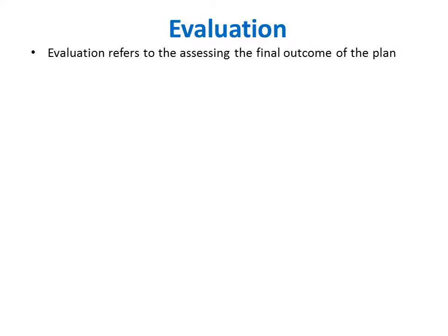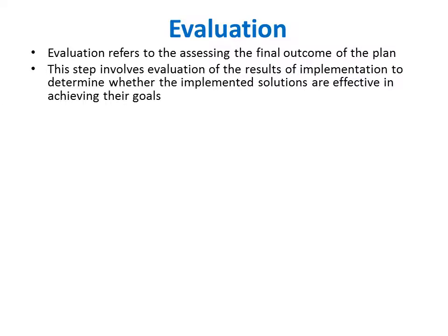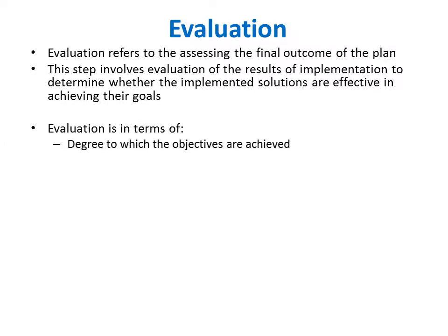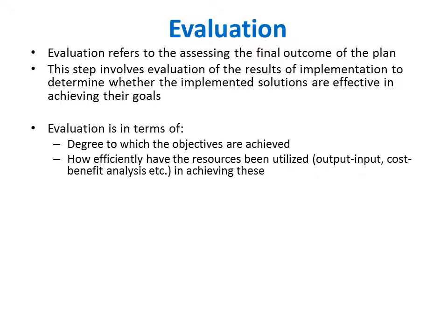Evaluation means final assessment of the program. This involves evaluation of the results of the implementation of the program to find out if the solution has been effective in achieving the objective or not. The evaluation is done in terms of the degree to which the objective was achieved and how efficiently the resources have been utilized, any wastage factors or something that could have been avoided in achieving these.